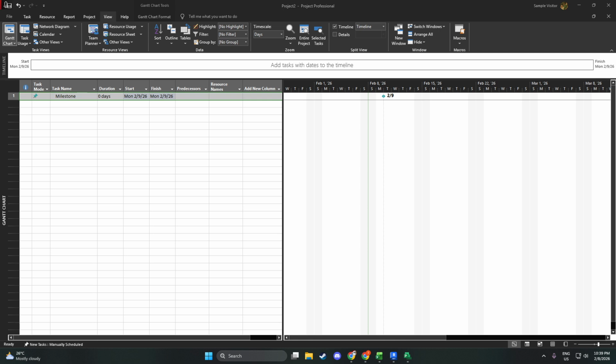And that's it. Switch to Gantt chart, choose where it goes, give it a clear name, set the duration to 0, and watch the diamond appear. Milestones provide a clean, visual way to track major moments and keep your team focused on what's next.